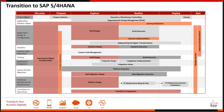This is the first step for us to understand what tasks are available, when they should be executed, and by whom. The work streams include project management tasks, solution adoption, design and configuration, analytics, custom code adaptation, testing, integration with third-party systems, and system and data migration — covering the new hardware, operating system, database, and data migration.